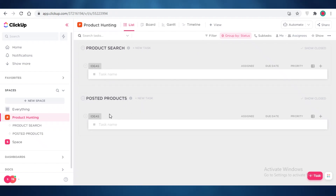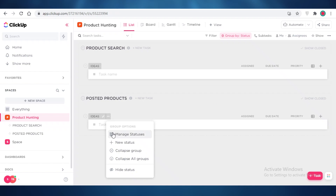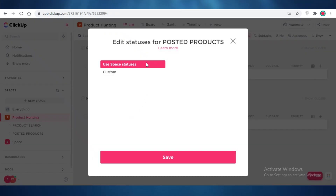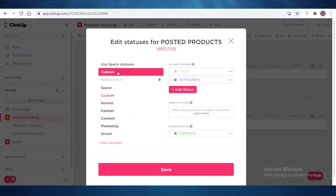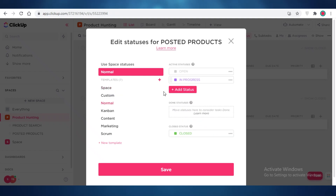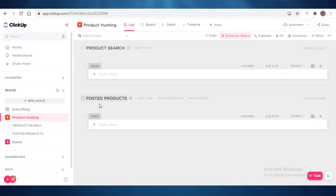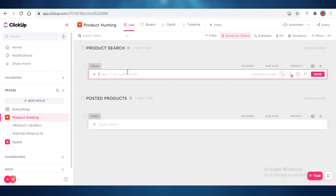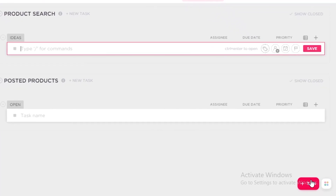Within each list, like Posted Products, you can remove and add different statuses and regroup them as needed. If you click on Custom you can add new statuses or use existing ones. For my Posted Products list I'm going to use a standard status workflow: Open, In Progress, and Closed.